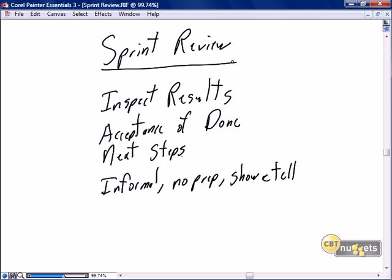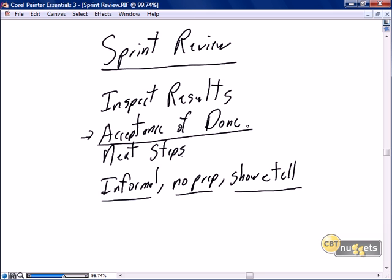At the end of the sprint, a formal sprint review meeting should be scheduled, happening basically immediately after the sprint is complete. The sprint review should be informal — no prep work, no elaborate PowerPoint presentations. I like to describe the sprint review as a show and tell. We demo all of the results from the sprint to the product owner to get their acceptance of done. For example: story 15 — here was our definition of done; here's our proof of done. The product owner says yes, and we move on to discuss the next steps.